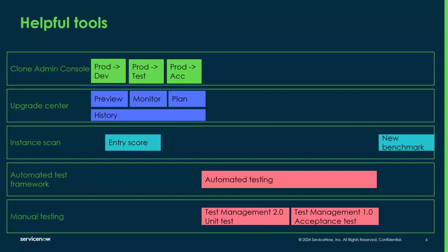But what enhances that is keeping track of the manual testing. One, because you know how many manual tests you're doing, that gives you the opportunity to gradually start automating those tests. Let's say there's 10 things that we manually test for the Xanadu release. Next time, when we upgrade to the new version, we want only 8 things to manually test, right? We can automate 2 additional things. So keeping track of that is good. And then the second one, we spoke about checklists, checking things off, making sure they are done. It gives you traceability. Have we run all the manual tests that we need to do?